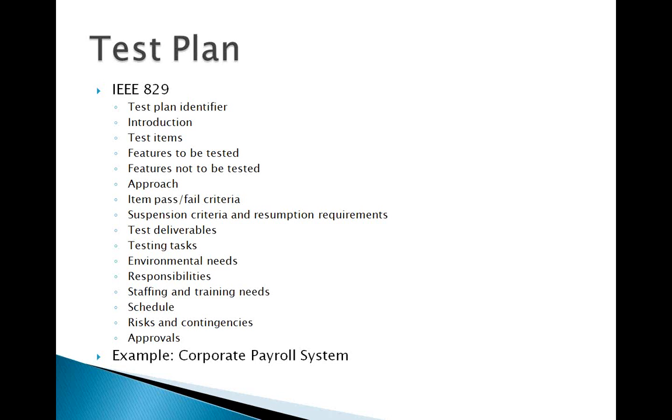So contingencies could be, okay, you have already talked to, let's say, an outsourcing company which can supply you temporary contractors to take care of the additional testing needs that may come up. Or the risk could be that the bug fix rate is very slow, right? The adequate testing could not happen, and a lot of bug fixes started to happen towards the end of the project.